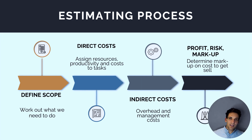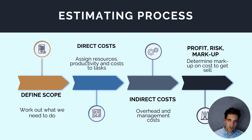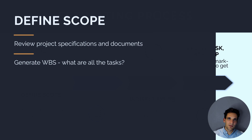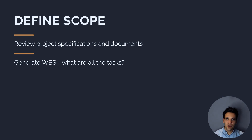Let's now look at the estimating process and step through how ChatGPT can help in each of these defined stages. First is defining scope — we've already looked at how ChatGPT helps us elaborate and define project scope. Next is calculating our direct costs: from the scope, we define the activities we need to complete the project and allocate costs and resources to each. Then we calculate overhead and indirect costs before finally applying our profit and markup. ChatGPT can help by reading and interpreting project documentation, understanding project specifications, and helping us elaborate and define scope by creating a work breakdown structure.